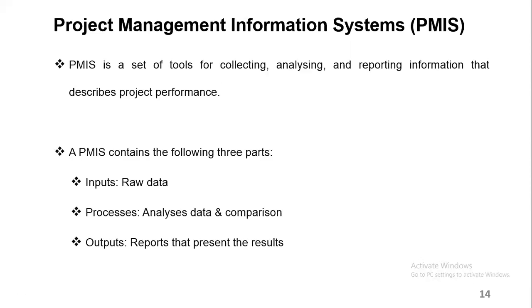Okay, analysis is in terms of the calculations. Maybe you might be doing some calculations. You want to calculate, let's say, progress of the project. You want to do some comparison, let's say, between actual and the plan, in terms of your work breakdown structure, in terms of your network diagram, all those dates you compare. And then the output, this is now your report that you will have to present.